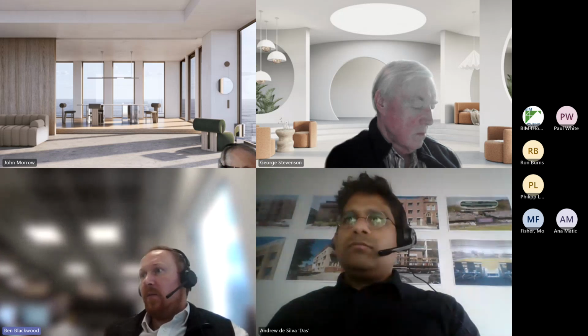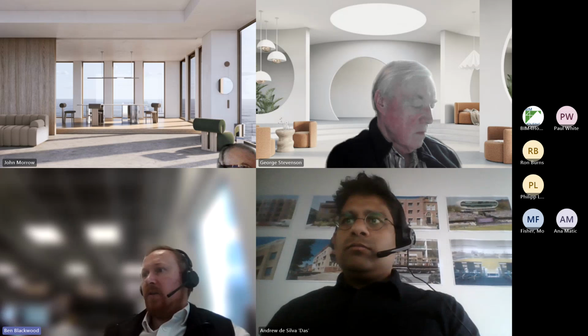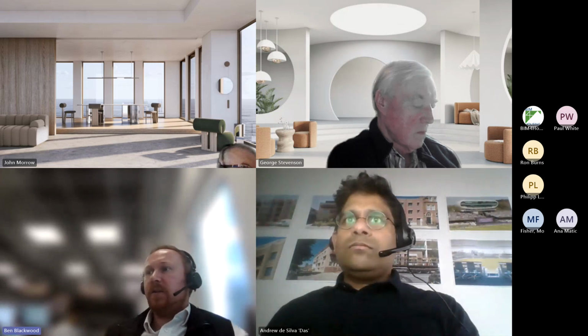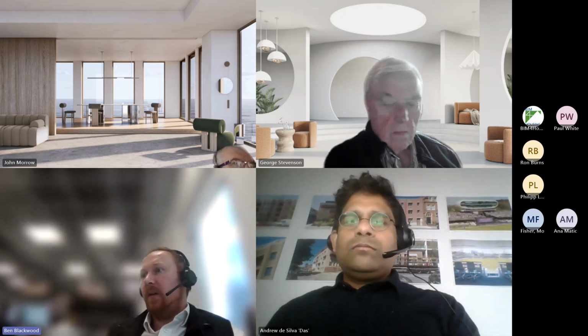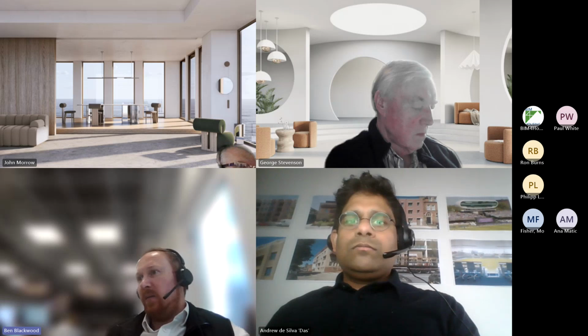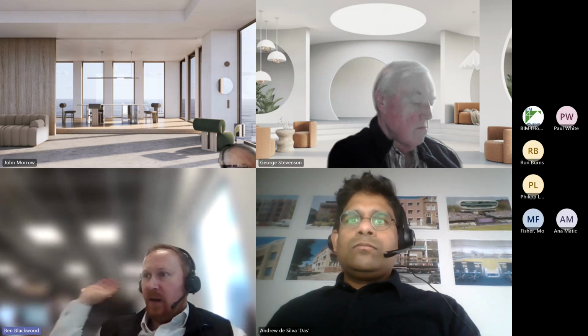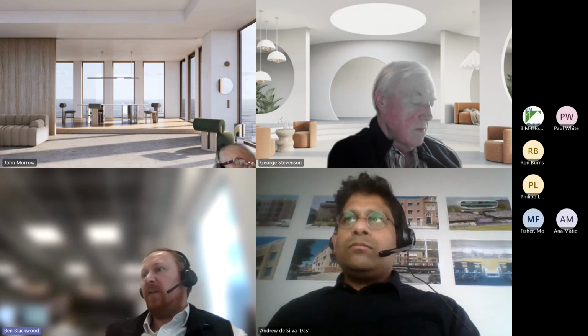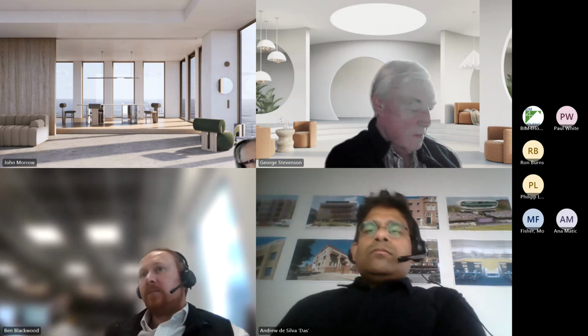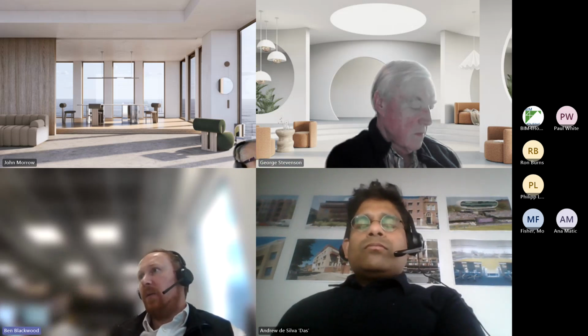And we go through that monthly to just check off. There's loads of things 6 months before the completion of the building. You can get at least 50% of it checked off and banked. And so the day before handover, like Mo said, you're not getting this grand slam of having to check everything. You're just checking the last 5%. Yeah, that seems to work quite well.